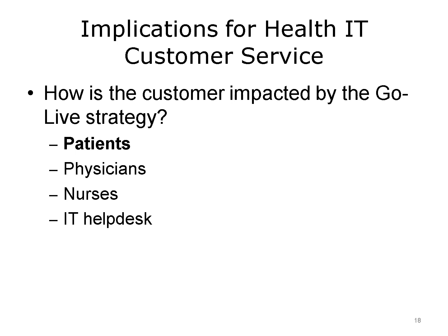In contrast, with the phased approach, medical information might become accessible in the different systems over an extended period of time. The hospital may be transitioned to the new system during the first phase, and the outpatient ambulatory clinics may be transitioned at a later phase. This period, when the hospital and clinics are not yet synchronized, may impact the patient's experience in obtaining medical records and scheduling appointments, for example.